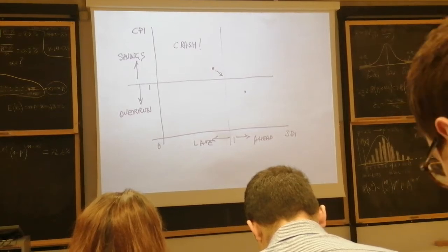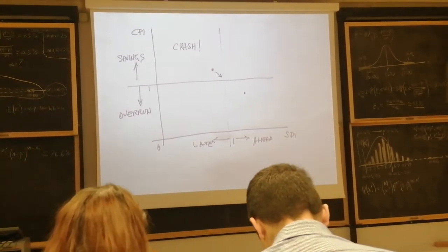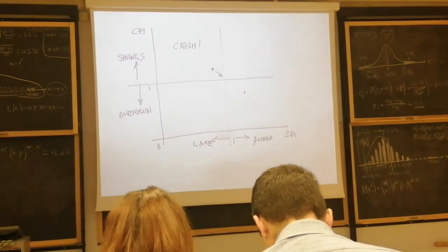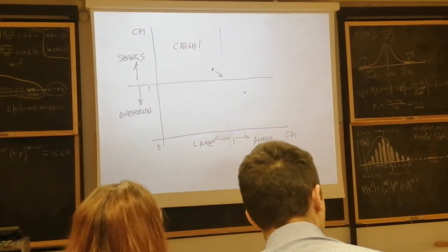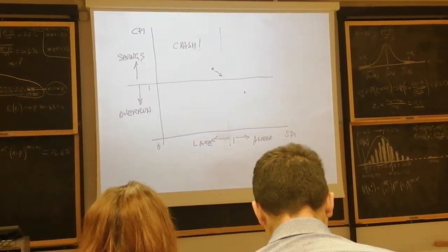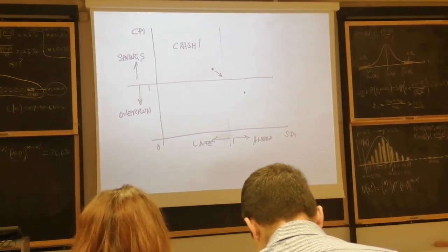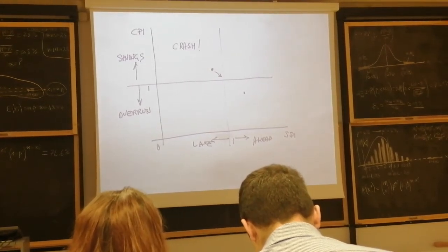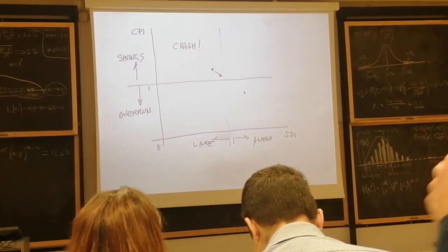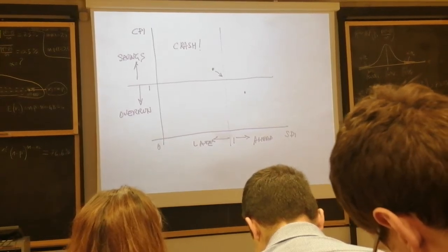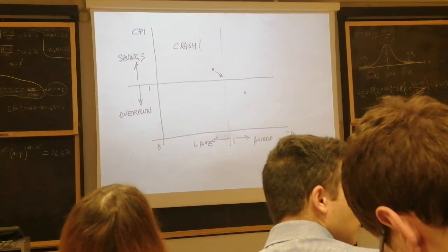And that's why you're doing a capstone project, to understand all those trade-off implications. But now assume you were in the right lower bottom part of the diagram. Schedule index is greater than 1, cost index lower than 1. So we are ahead of time, running fast, but spending money. It's as if we spend too much money to go too fast.